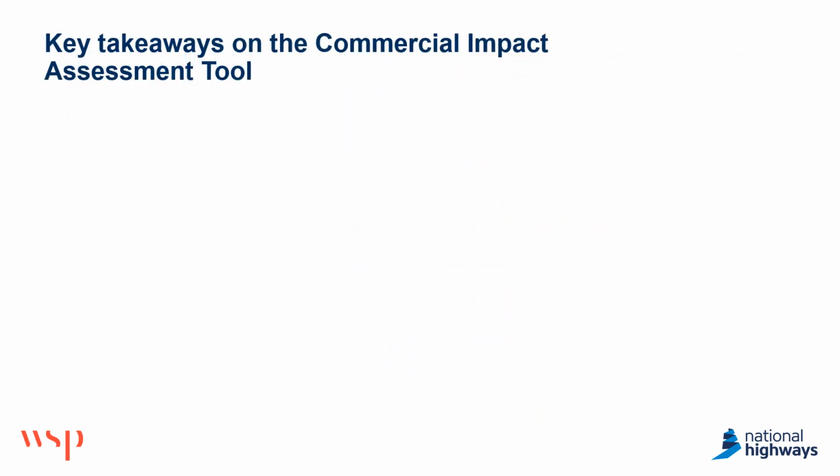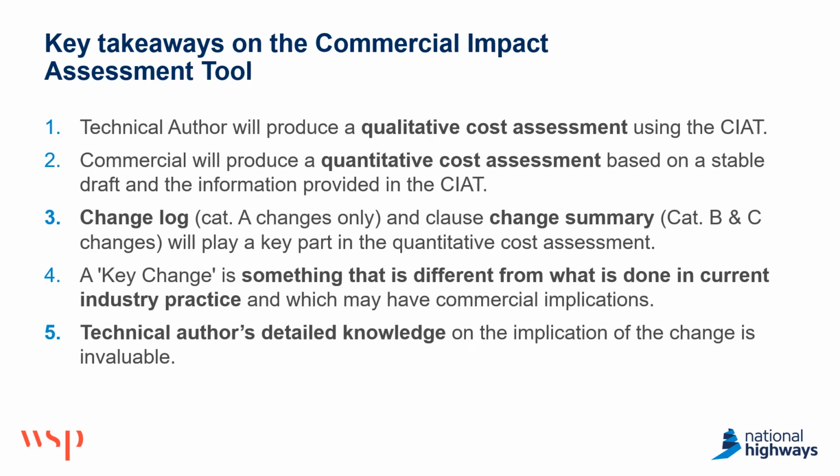To conclude this section, we'll just talk through a few key takeaways on the commercial impact assessment tool. So the technical author will produce a qualitative cost assessment using the commercial impact assessment toolkit. Commercial will produce a quantitative cost assessment based on a stable draft and the information provided in the commercial impact assessment toolkit.